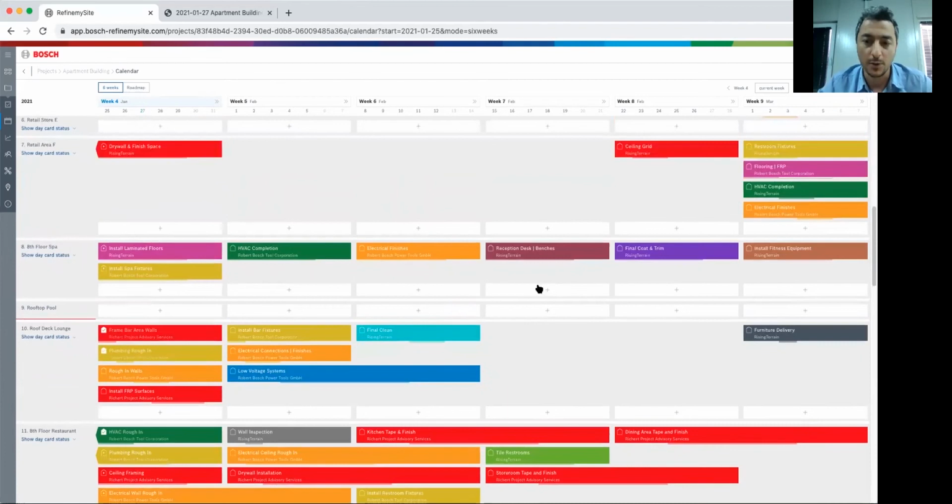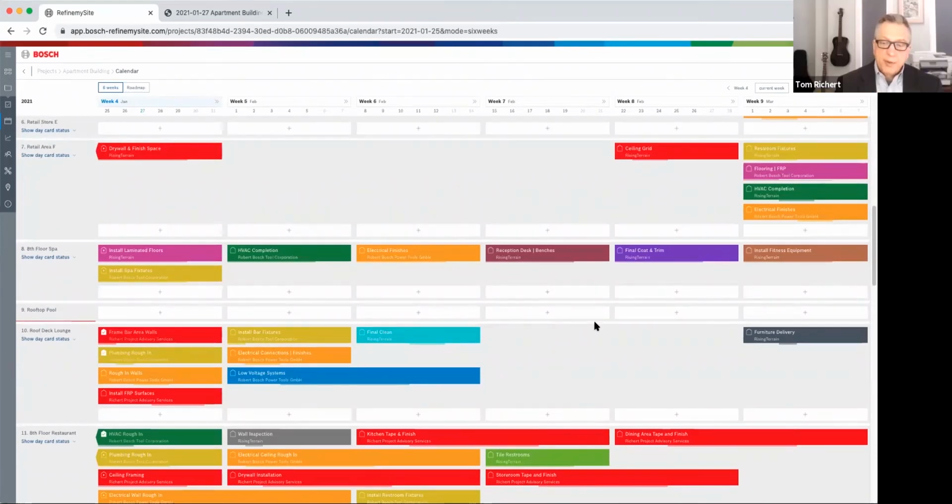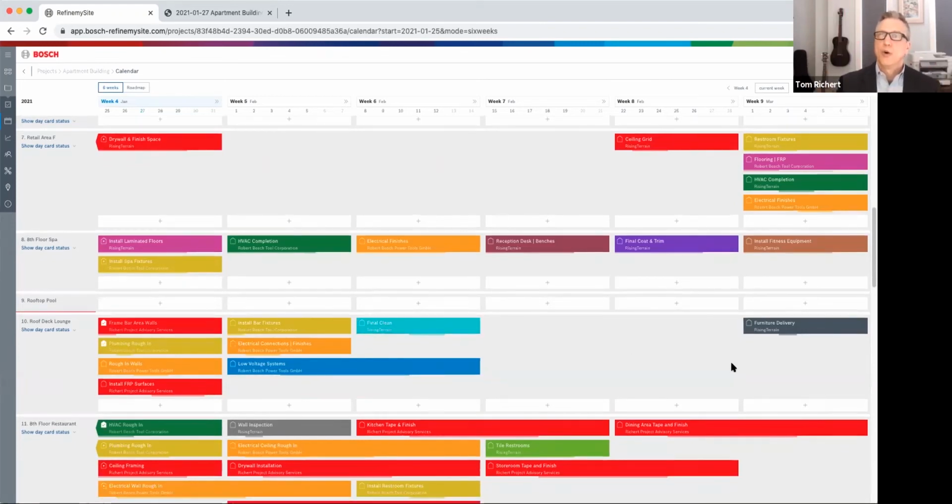Yeah, and that's another way people track material, if it's a commitment on a constraint log. In Last Planner, ideally there are really only two places where a commitment might be. It can be on the plan, represented by these taskbars, or it could be on a commitment log, or a constraint log is essentially a commitment log. I want to make sure we answer questions too as we go. So, because there's a good question about buy-in.